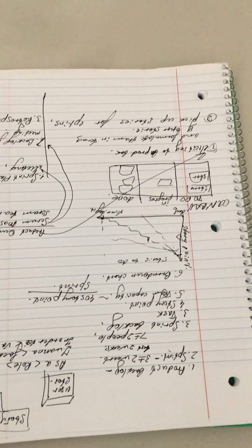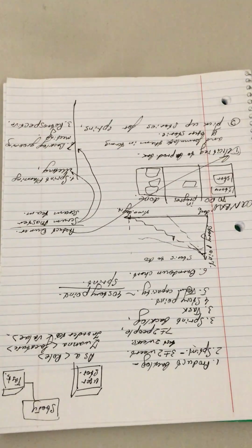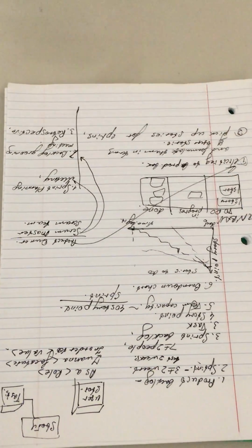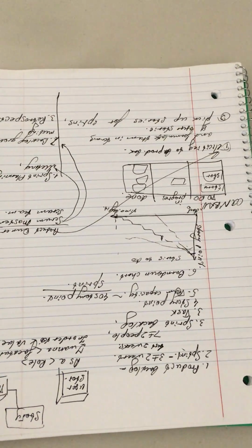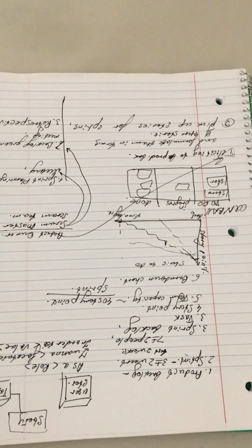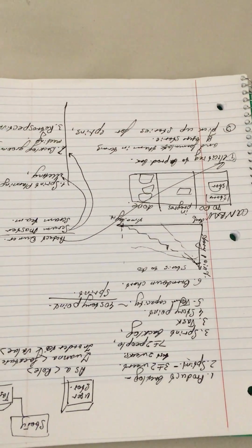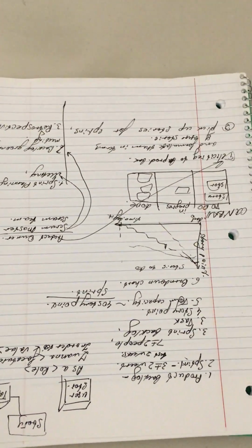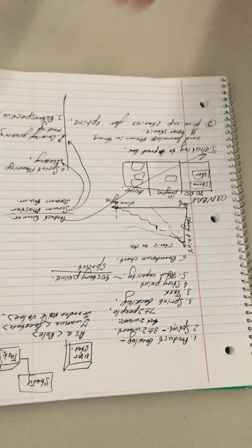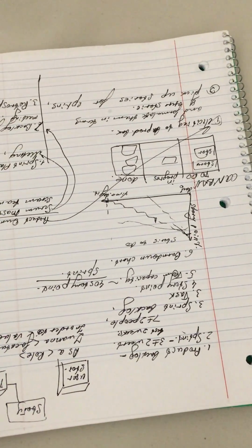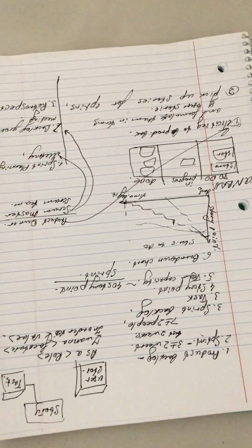And here is a very important thing. The key difference between Scrum and another methodology, Kanban, which could also be treated as a complete methodology, is that unlike Scrum, it has no time boxes. Scrum has always very strong time boxes. You committed to have this done within 2 weeks, and you should do that within 2 weeks. It should not linger forever. At the end of 2 weeks, we're gonna ask you what is done. If it's not done, you're in trouble.